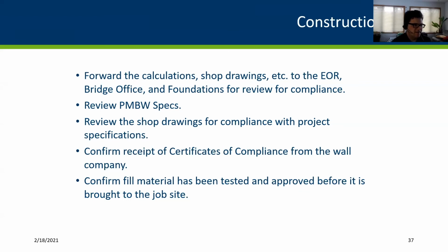I will say at this point, because these are prefabricated units, and also the thin panels of the MSE are prefabricated, those are reviewed in the field just for general damage that may occur through transportation, but someone is inspecting them at the plant as well. I think that helps the process, but of course these units should be inspected in case during transportation they were damaged and are no longer compliant with the specifications.